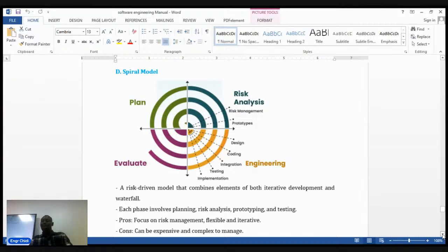So these development lifecycle models are there, but they have a time when each of them is required. We have said that Waterfall model is when you are building a smaller software. Agile is when you are building a large software. Spiral model is used when you think the software you are building has some element of risk. For example, you are building a software for financial institutions.